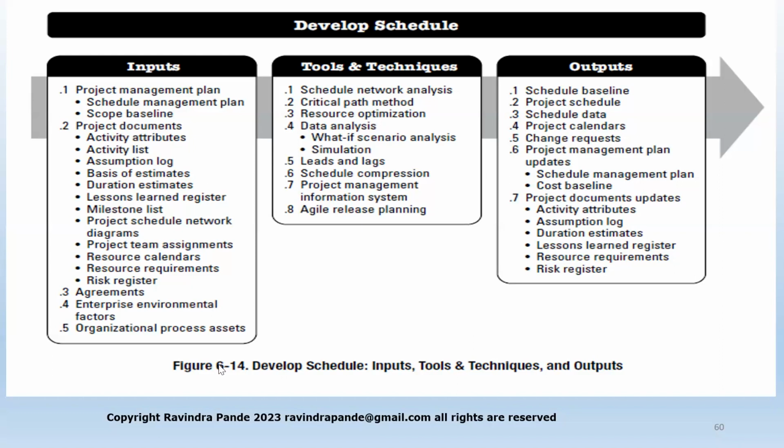Now, all this mix and balance of resource requirements has to be considered whenever we are raising a new resource requirement or putting requests for new resources to a resource manager. The resource manager might give you two bench resources when you need one senior resource, and this normally happens in practice. He says, oh, we have two resources, so take two rather than one. But whenever you require one resource who is senior enough, with the skills and proficiency, you might not get what you want. This is a real practical scenario in every project.